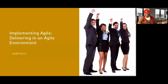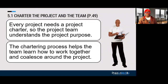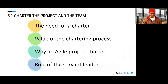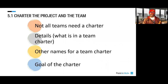The next chapter is about delivering in an Agile environment. The big thing is the charter — no charter, no project. Every project needs a project charter and Agile projects are no exception, so that the vision can be crafted and there can be direction. There's also something we call chartering: we need to create a team charter. We also call it a social contract, a team contract, or a team agreement.